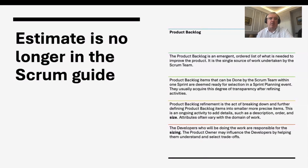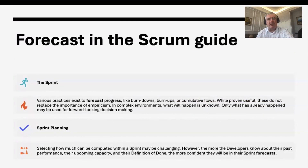Estimate is no longer in the Scrum Guide. In terms of the word 'forecast,' the Scrum Guide is quite flexible about what you might use. A lot of people still think burnups and burndowns are required, but they're optional. You can use pretty much any technique, as long as it helps you think and act empirically — deciding what to do next based on evidence and learnings from what you did last.